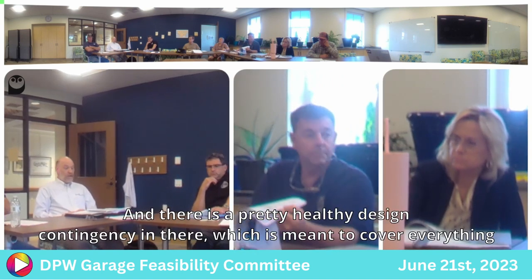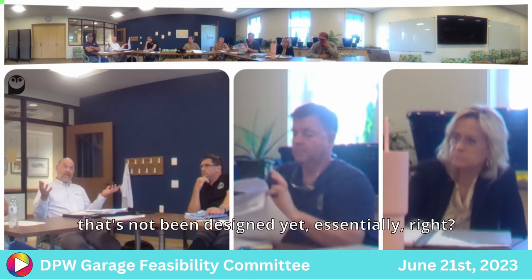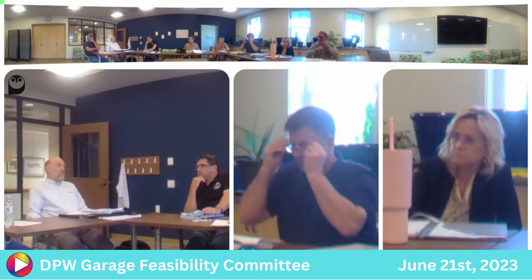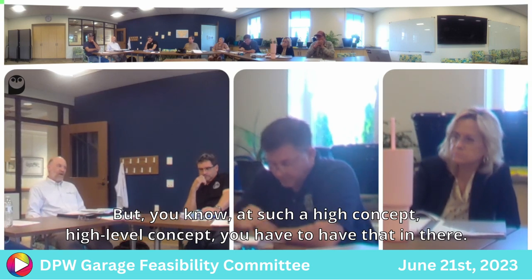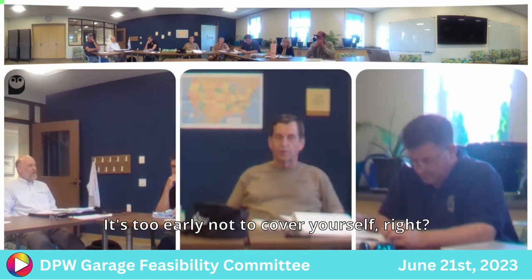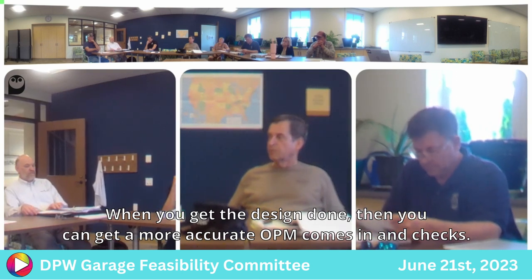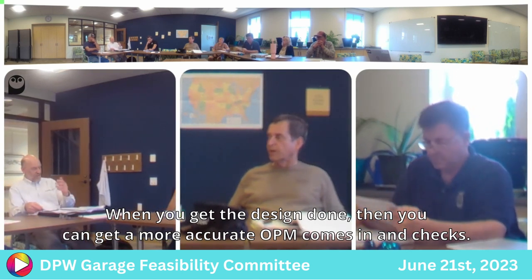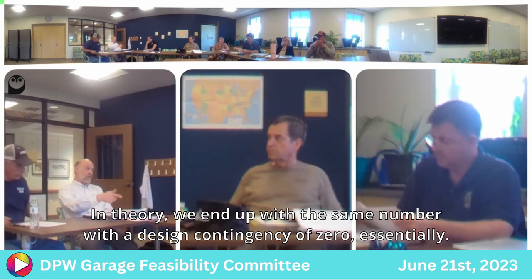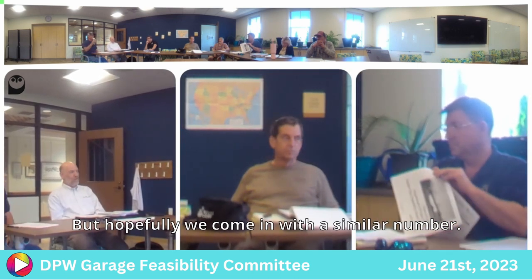And there is a pretty healthy design contingency in there, which is meant to cover everything that's not been designed yet, and it is like 20%. It's a big chunk, but it's such a high-level concept that we have to have that in there. It's too early not to cover yourself. Exactly. When you get the design done, you can get a more accurate number, and your OPM comes in and checks. In theory, we end up with the same number with a design contingency of zero, but hopefully we come in with a similar number.